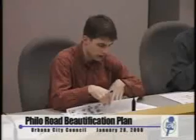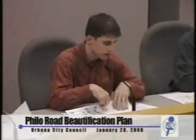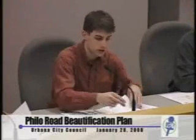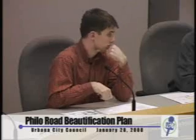Yeah, I support both of those postponements personally and haven't heard big objections to them, and feel like whatever we need to do to make sure it's clear what the priorities are, that this project is important to us. So thank you very much. And I'd like to make a comment. We could also put in some add alternates. Because we have a 30% contingency, it might be possible to have banners be an add alternate, so we get it priced out, and then we add it in if some of our other bids come in lower.